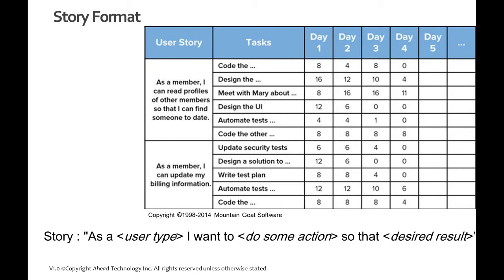And you see each user story can then be broken down by the tasks to deliver that story. This is the work of the development team. And they've just recorded the team hours that they're going to spend on each of these tasks. And this just continues throughout the sprint.